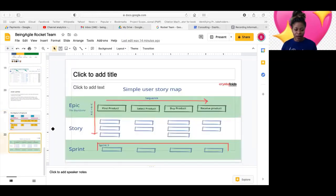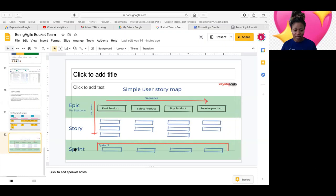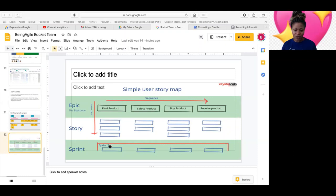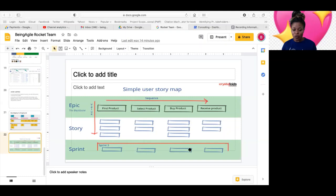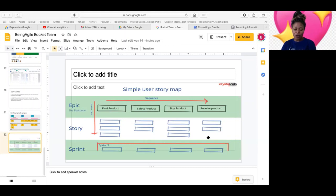And then looking at this one, all of what we just saw in this slide 21 here, I just added this just to help you see how it boils down into the sprints. So now in sprints one, you're seeing that all of these stories here, you want to do them in sprints one. And then eventually, after sprints, yeah, sprints, let's assume that this was sprints one, sprints one, sprints two, sprints three, sprints four, you now have the release. Let's say you release every four sprints, for example. You now have everything you want to release.